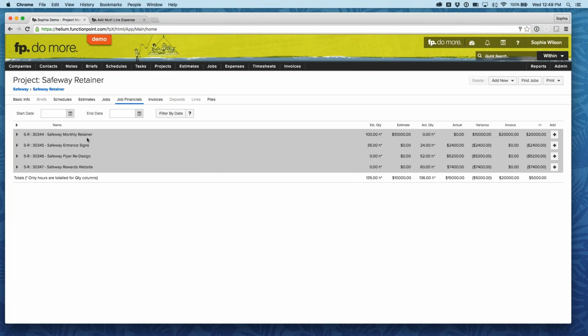So in this example, if you enter all of your expenses against this retainer job, it's really simple. I'm not going to go over that. You just bill the 10,000, and then you add all the expenses that you find in there. If you add an additional job and call it the expenses tracking job, that's pretty simple too. You just do a multi-job invoice with this job, the other job, and include the expenses. If you want to slot your expenses into the job that they're related to, that's where it gets a little bit trickier, and that's what I'm going to go over.